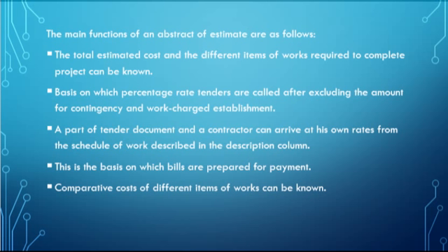A percentage of 2.0 to 2.5% is also added to meet the expenditure of the work charge establishment. As I discussed earlier, what is work charge establishment? Before starting work on any site, you require some people like a site supervisor, watchman, etc. That is work charge establishment.